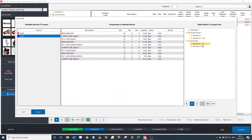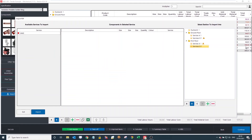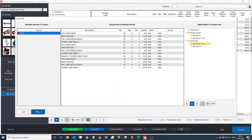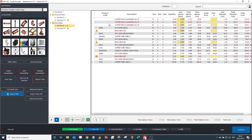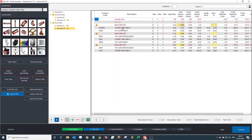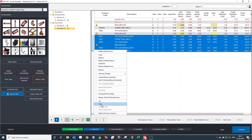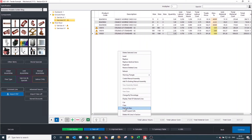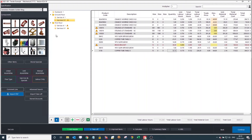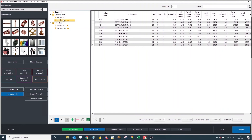It shows me my two relevant services. I'm going to read CWS into Service B — I'll highlight both and press Import, and those items have moved across. For Service A, I'm going to import the hot water service. What that's done is read in a good number of lines and input all the quantities very quickly. You could also copy and paste any of these items onto other sections if you have the same thing on multiple floors, or read the same file into the job again — whichever you personally prefer.